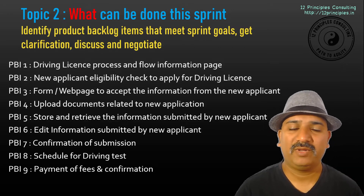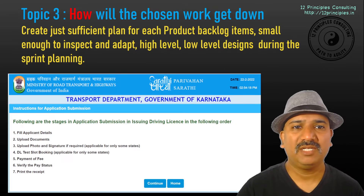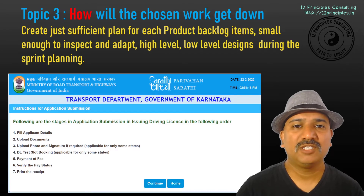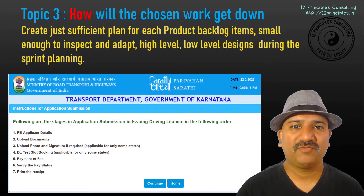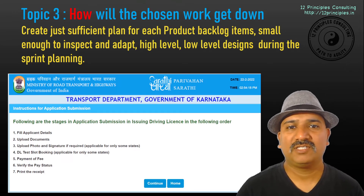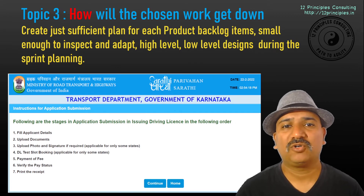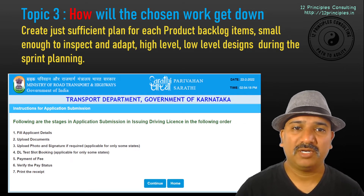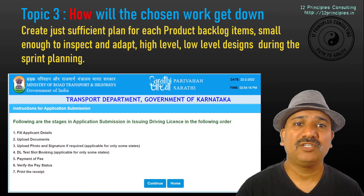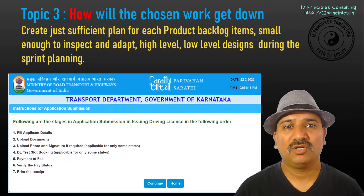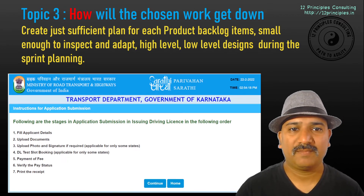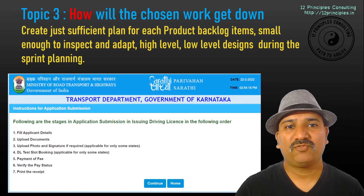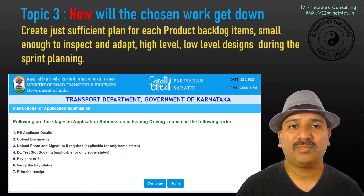That brings us to topic three: team members creating just a sufficient plan for each of the Product Backlog items so that they can inspect and adapt during the Sprint. This plan could include task-level information, high-level design, definition of done, low-level design thinking, and test scenarios — any information that would help the team plan well. Topic three, how will the work get done, can be revisited multiple times during the Sprint by the developers. The Sprint Backlog also evolves over time during the Sprint with just sufficient planning, and the daily Scrum — inspecting and adapting on a daily basis — helps the team come up with a better plan through to the end of the Sprint.